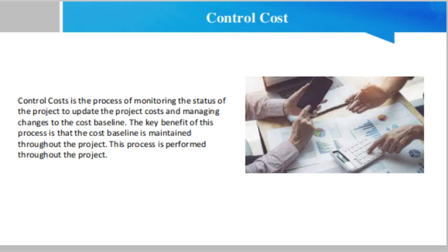Much of the effort of cost control involves analyzing the relationship between the consumption of project funds and the work being accomplished for such expenditures. The key to effective cost control is the management of the approved cost baseline. Project cost control includes influencing the factors that create changes to the authorized cost baseline, ensuring that all change requests are acted on in a timely manner, managing the actual changes when and as they occur,